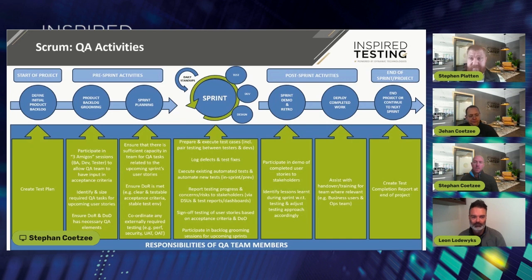So what I would advocate is a bit of a mix. I think if it's a high priority defect, or if it's a defect that has a critical impact to the user, it is fixed before release. If it's a P4 or P3, a low priority one, you could push it to the backlog, but it's still got to be a balancing act. It can't just be, it's a P3, we immediately push it to the backlog every time. It should be, it's a P3, let's look at it in conjunction with other things that are happening in the sprint. Does the team have capacity? Can we fix it? Well, then let's do that. Don't just create a black and white rule where all lower priority defects immediately go to the backlog.